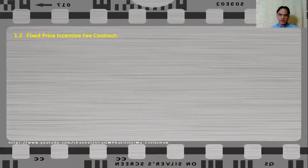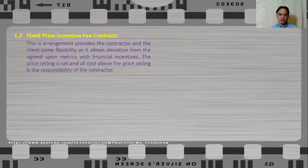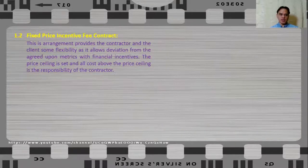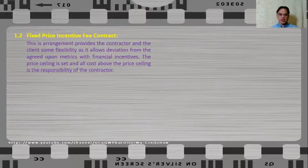Let us now take a look at fixed price incentive fee contract. The price is still fixed, but there is some sort of incentive for the contractor. This arrangement provides both the contractor and the client some flexibility as it allows deviation from the agreed-upon metrics with financial incentives. The price ceiling is set and all costs above the price ceiling are the responsibility of the contractor.